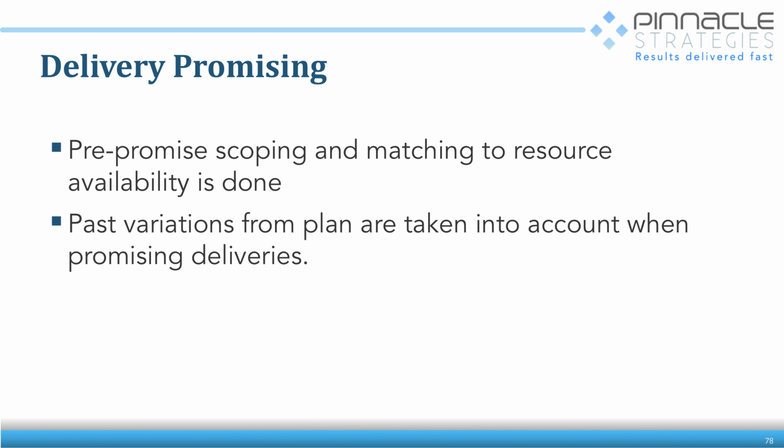I'll give you an example. We were with a company and they thought that their constraint was doing 5 a day. And we started measuring, and actually they were doing 3 a day. And they were making all their revenue promises and all of that stuff based on 5 a day.